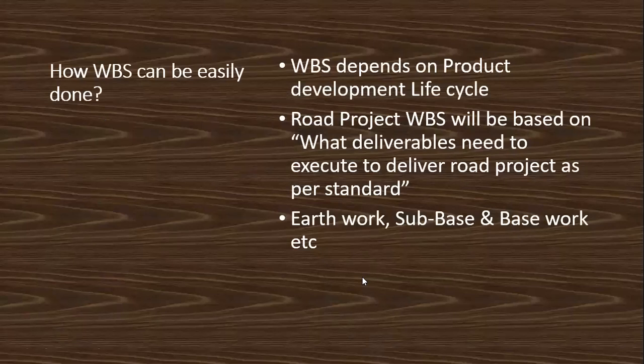I'll clear. In WBS, I'm going to explain one thing. What is the methodology? You have to divide your project with the help of WBS into deliverables. Then when you further divide the headings, you will get work packages. And then when you further divide your work packages, you will get activities. So these are the things you will get by the WBS technique.